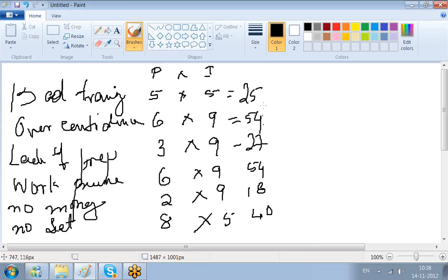Now, every risk you cannot manage because risk management is expensive and time consuming. So you'll have to prioritize. Every company may have some norms, it is not constant. Company to company it can change. We call it a threshold. So let's say our decision criteria is anything 30 and above we'll manage, but anything less than 30 will be under observation. If that criteria is applied, this we will manage, this we will manage, and this also we will manage. The rest of the things will be under observation.